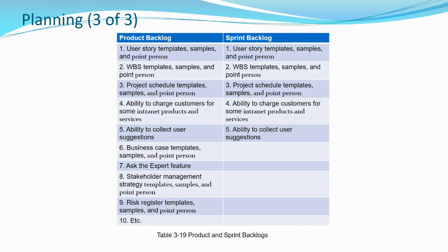So, in addition, we can see here that we've got a product and a sprint backlog. The product backlog are all the things that we need to get done in a Scrum scenario, and the sprint backlog is what we are going to take on as part of this sprint. Now, a part of this too, when we look and we see story templates, or user stories rather, user stories mainly are the ways that users are putting their requirements or expectations into common speak, so we can turn those into technology requirements.